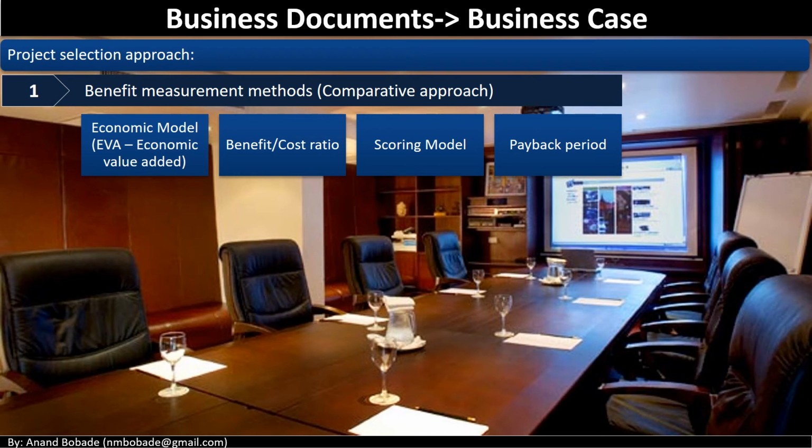Payback period. It is a ratio of the total cash to the average per period cash. It is the time necessary to recover the cost invested in the project. The payback period is a basic project selection method. When the payback period is used as the project selection method, the project that has the shortest payback period is preferred, since the organization can regain the investment faster.